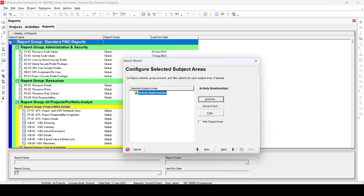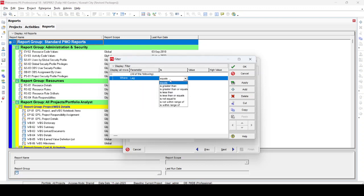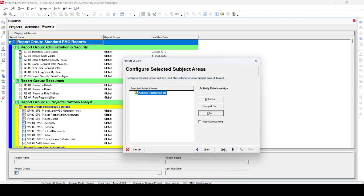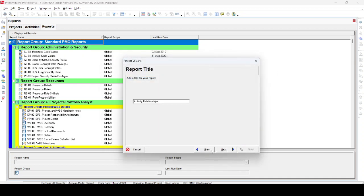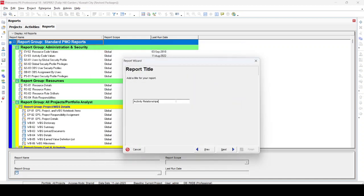Click OK, then go to the Filter option. In the filter, type 'l' to find the Lag field, then set the condition as Lag is not equal to zero. This will show all activities having a positive or negative lag. After selecting this, click Next. On the Group and Sort page, keep it as is or modify as needed, then click Next again.